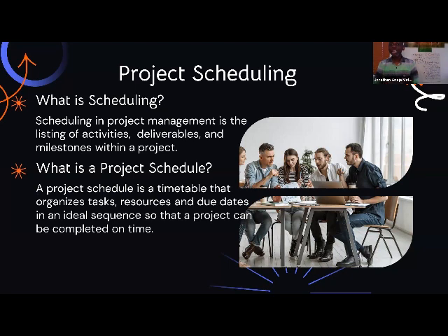There's what we call finish to start, start to start relationships that you attach to your activities to help you schedule it properly. You need to be familiar with your predecessor activities. There are attributes so that you can use MS Project to draft reports. You can do a lot of reporting, cost and time reporting. You can measure your project performance, what we call SPI and CPI, schedule performance and cost performance, using that software.